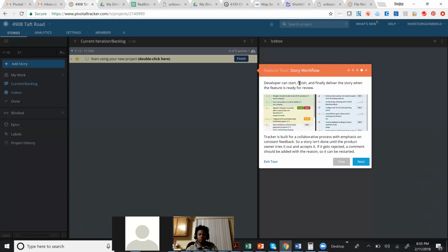And then an epic is like a theme of the story, meaning you're going to be doing all the work in a bathroom. It's called an epic. And the list of user stories, the list of tasks, are put into an ice box first, and then you're picking each and every task and putting it into a current sprint. A sprint is where, in 1 week, you decide how many tasks or user stories are going to be done.